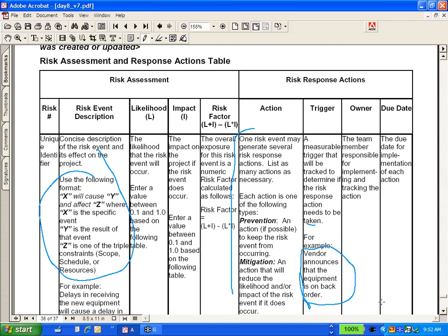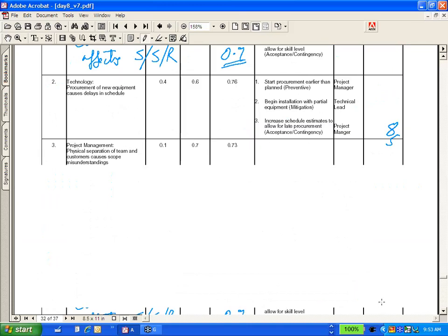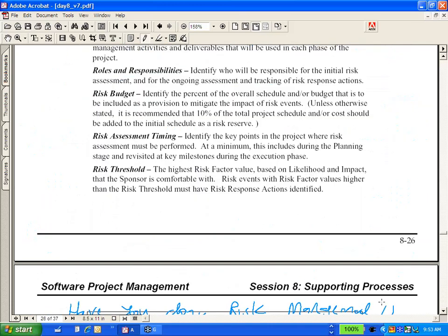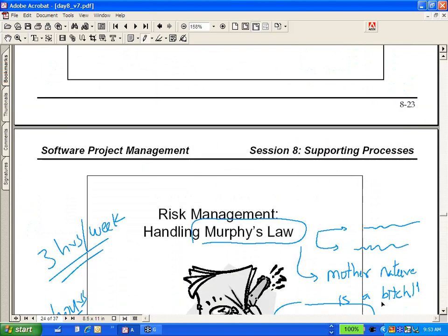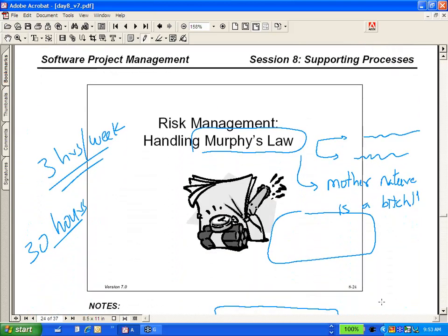Yeah, delay in individual tasks. And if your tasks are getting delayed after delayed after delayed, then you have a trigger that something is wrong with my team. That's why it's okay for one task to be delayed. It's okay for two tasks to be delayed. But if every week we are falling behind on tasks, then it means there's a problem. So that's your trigger. So again, I would request you guys to go through every page here, even though we've covered 90% of it. And you have a next homework on it, yeah?